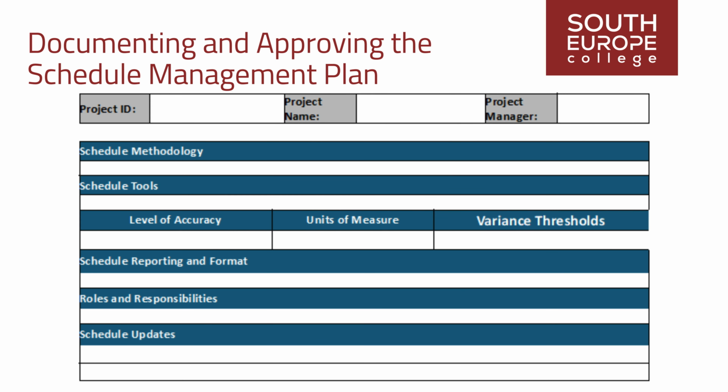The schedule management plan is usually put in a document and presented or reviewed to the project sponsor and other key stakeholders, such as the project management office or the program manager, in case the project is part of a program, to ensure agreement and obtain approval on it.